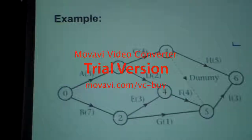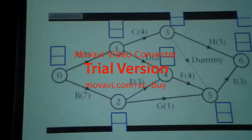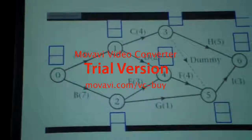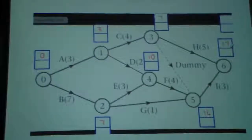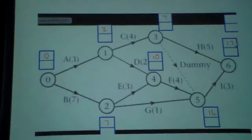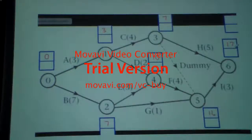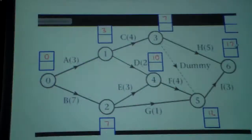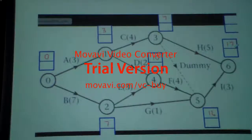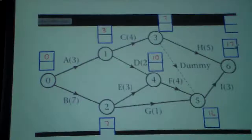Same problem. So how to solve? First we have to take 2 squares for each. Start from 0, from activity A. How to calculate it? 0 at 0 is 0. Then A is 3 to the day — so 7. Here in this example, up is early time, down is late time. It doesn't matter how to solve. Here 7. Then if we go from 7 plus 3, it's 10. If we come from that side, 3 plus 2, we have to select the largest one. And same like this: 3 plus 4 is 7, and there is another entrance, so it should be 7.